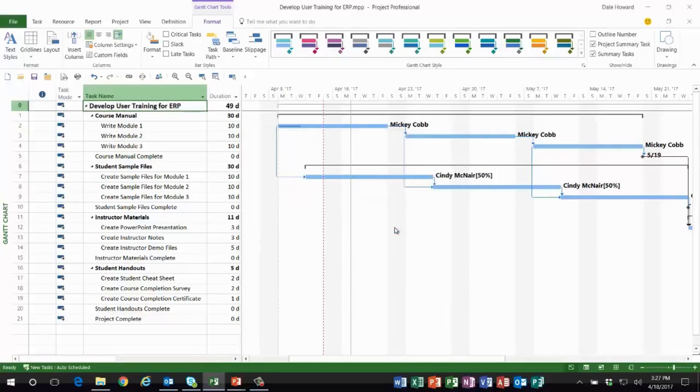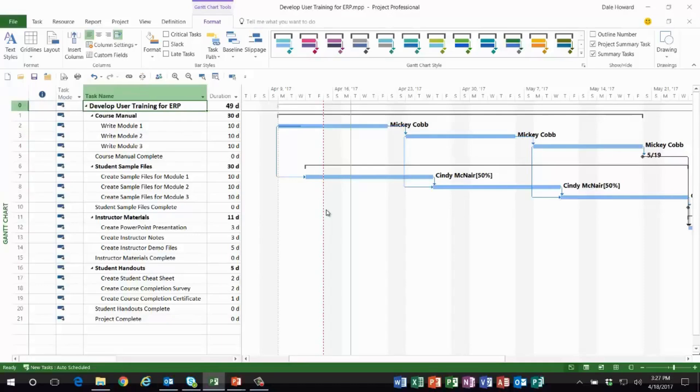get. Oh wow, look at that everybody! See, that red dashed line represents last Friday, the last day of last week's reporting period. Displaying this makes it easy to remember every week to move the status date line to